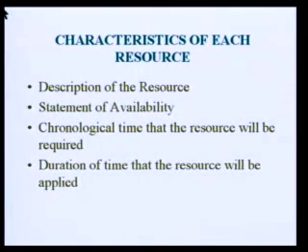Characteristics of each resource: description of the resource, statement of availability, chronological time that the resource will be required, and duration of time that the resource will be required. So as I said, after you make the order of requirement, then comes how long you need. How long you need to utilize some software, how long you need to use a particular professional, or how long you need to use some third party software, or some third party industries which will be helping you in the system integration stage. All these things you have to decide. So only after deciding will you be able to go to the next step.